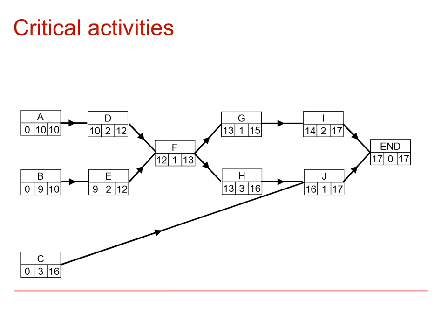If we look for those, we'll see that certainly A is a critical activity, so is D, and F, because we've always got these numbers. 13 minus 1 is 12, which is equal to the early start time, for example. If we look at G, that's non-critical. 15 minus 1 is 14. But H is critical, J is a critical activity, and obviously that comes to the end.